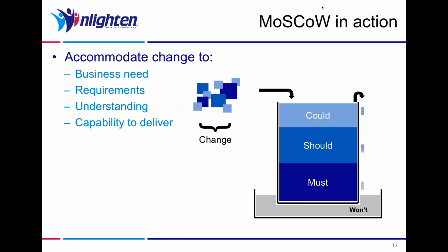Where does it fit then in terms of these other requirements? Yeah, so we need to make some space. Yeah, which of these requirements can we, these must-have requirements, could we make room for? Well, we can't make room for any in that. Well, that's only to be expected. They are must-haves after all. Okay, so how about these should-have requirements then? How important is this new requirement that you've brought to me compared to the should-have requirements that we already have in the stack? It's your call on this.